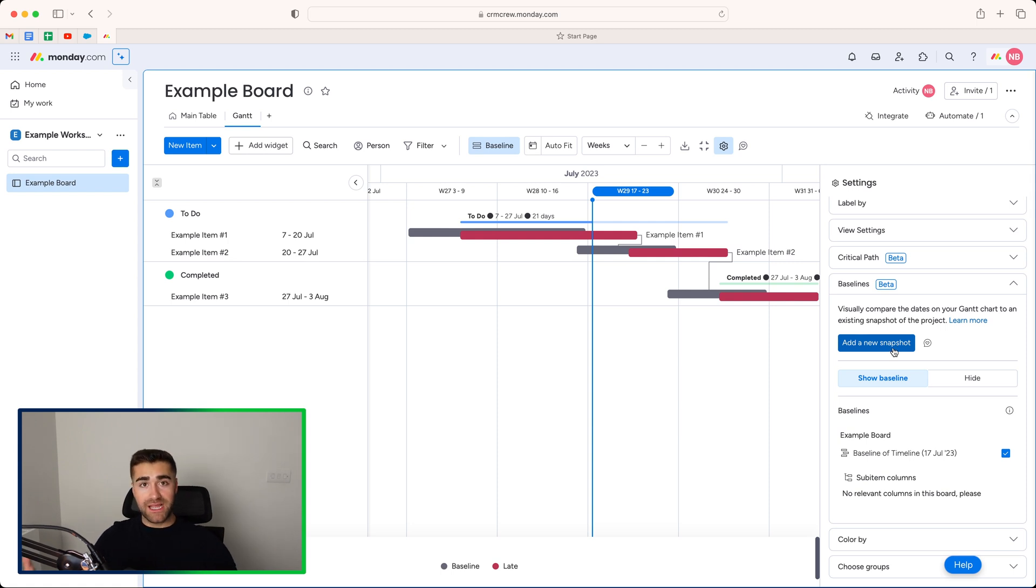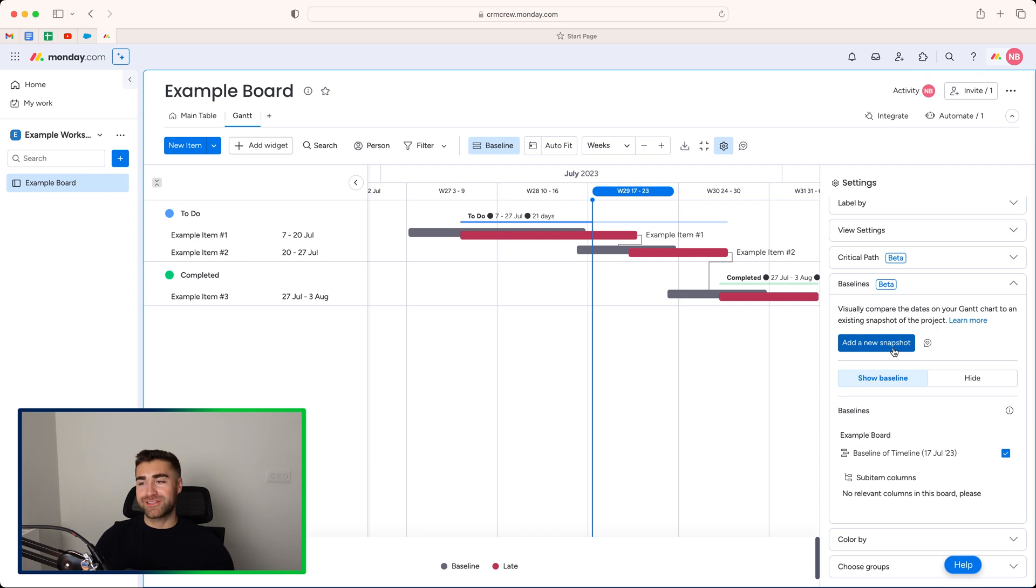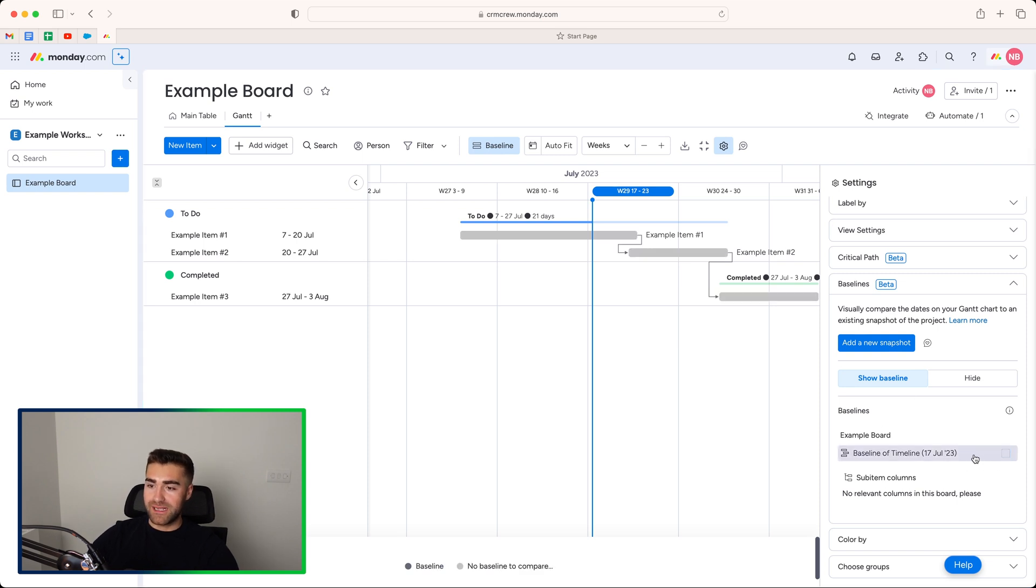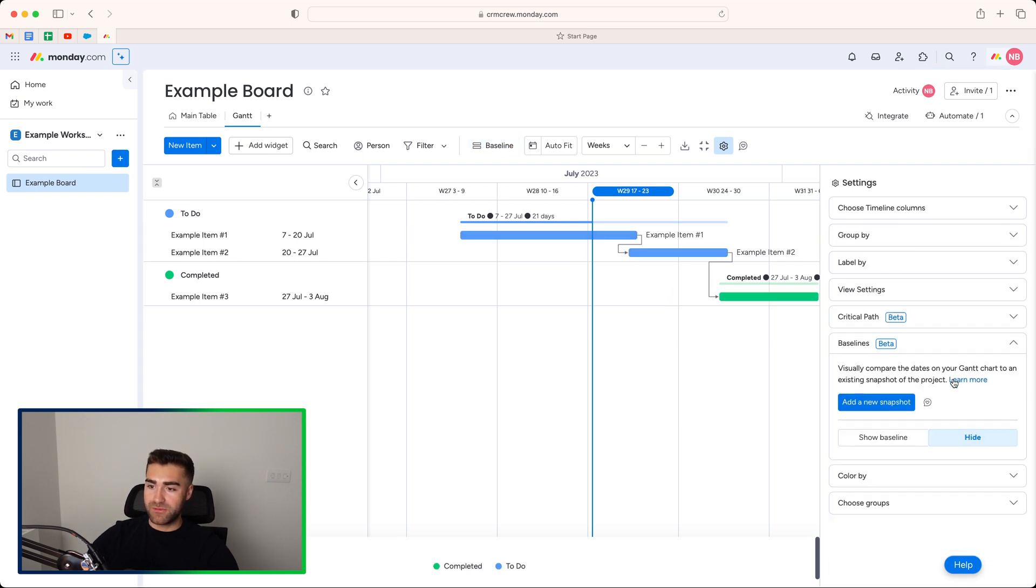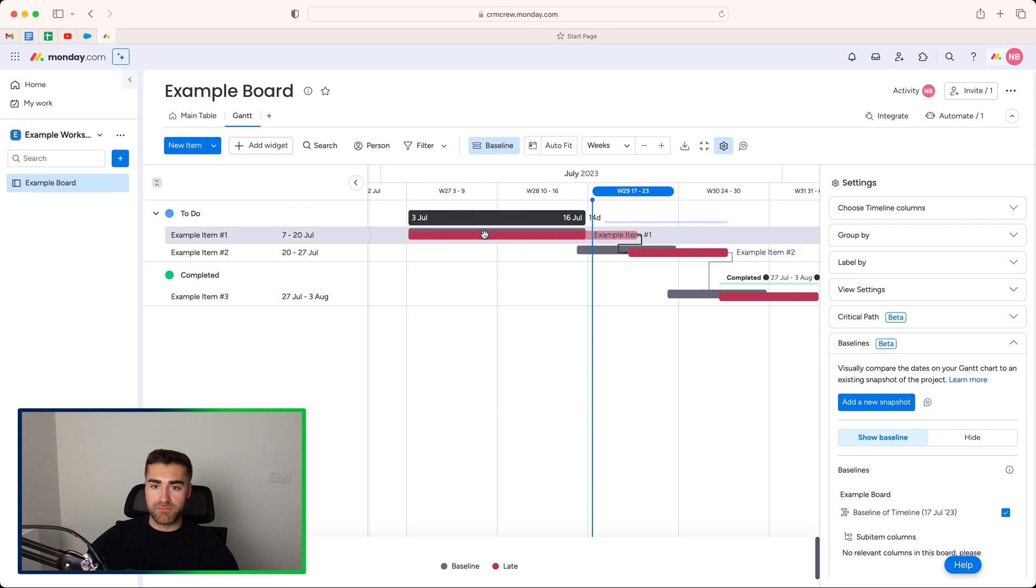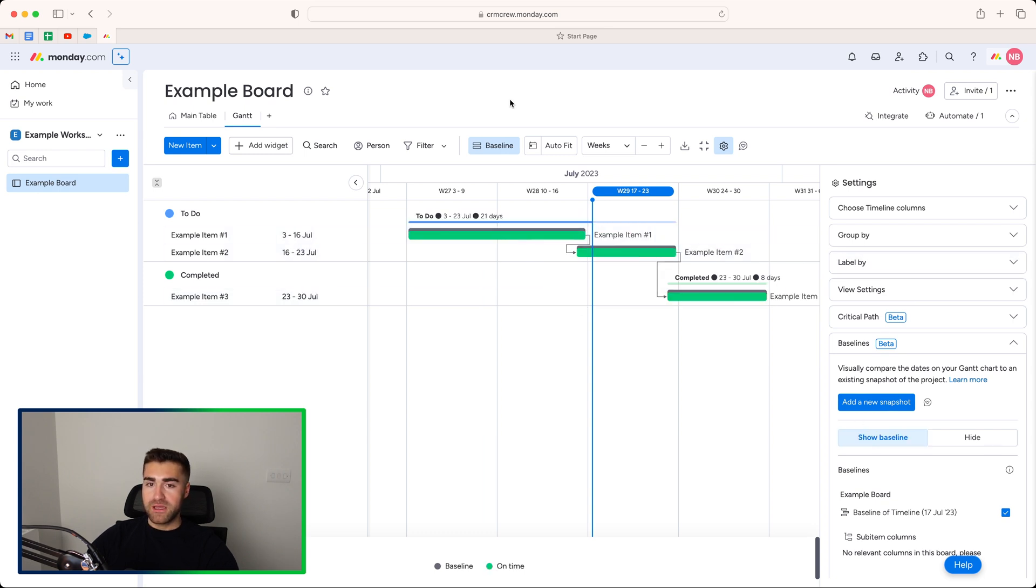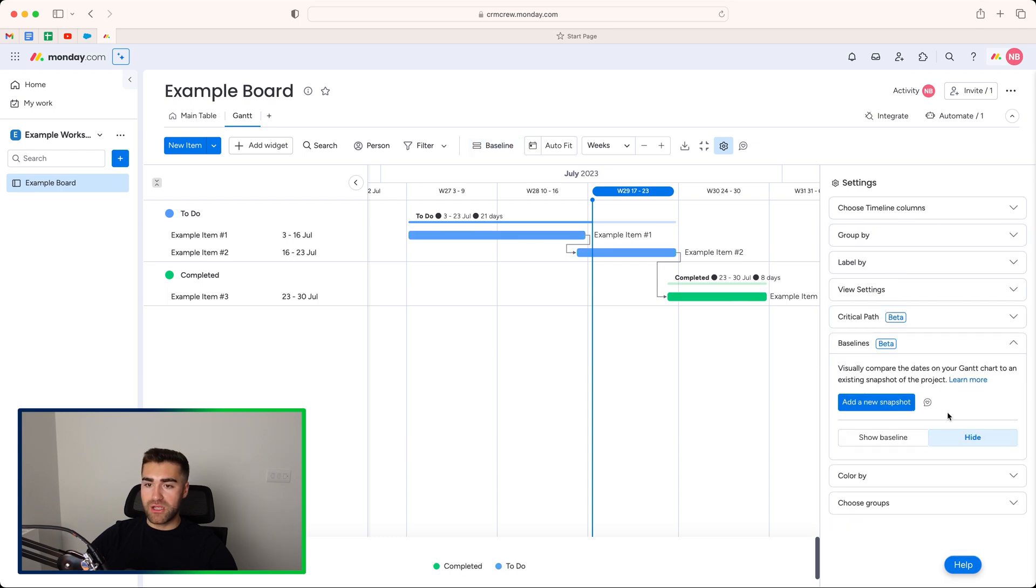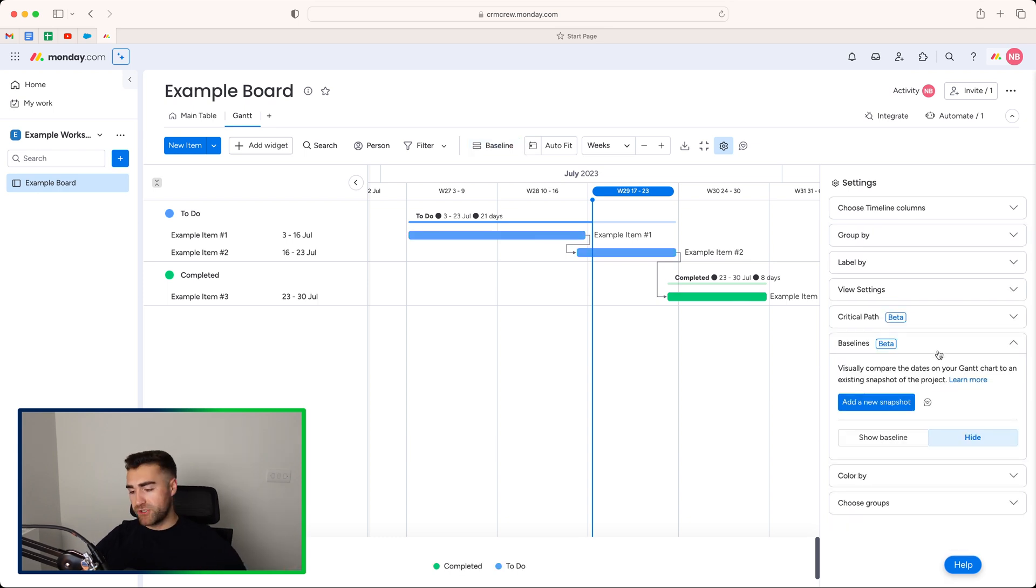And you can take multiple snapshots. So you can do this over an extended period of time to see how positive, how well the project has gone or potentially how bad the project has been as well and how late you are to completing it. We can go ahead and unselect these baselines. We can hide them if we want to and show them whenever it's useful. I'm just going to move this back. So you can, like I said, you can have as many as you like. Really, really helpful.